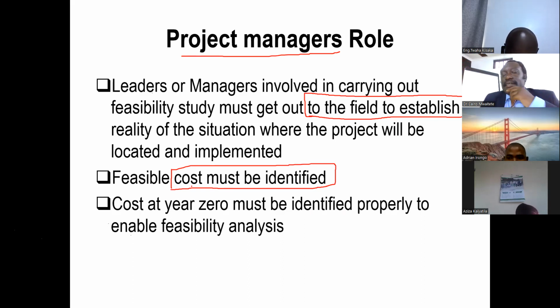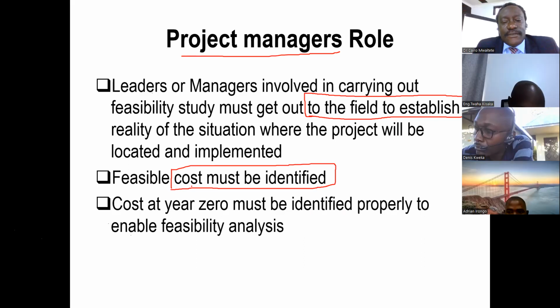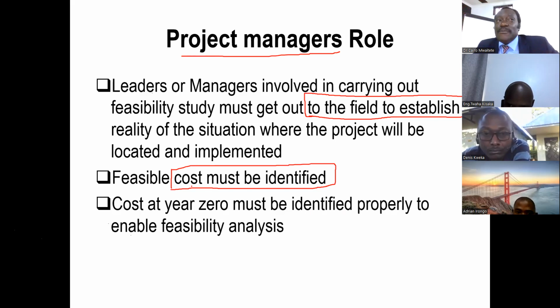Thank you. Very good. There are so many criteria that we use when we are talking about worthwhile projects. Worthwhile from the financial point of view. Yes, whether to implement or not to implement is decided after knowing the returns. Now, how do you know the returns? You can use NPV, you can use internal rate of return, you can use the accounting rate of return, you can use the profitability index, you can use the payback period, and others like those. So you can use those ones.